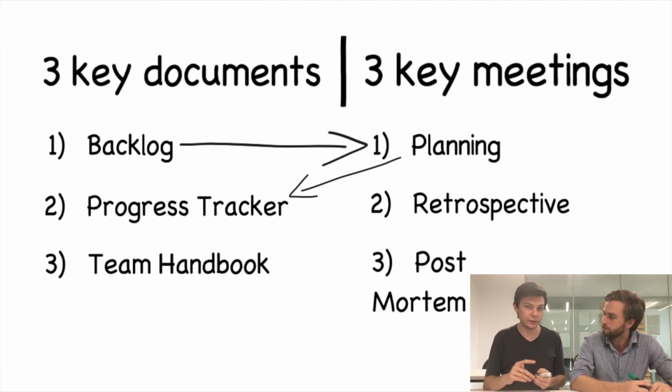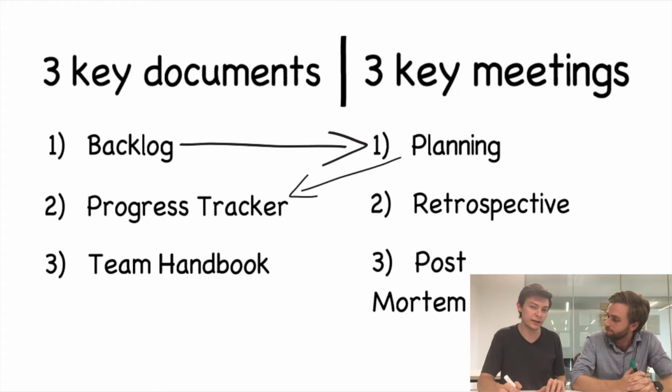At the beginning of the sprint, you pick your priorities and what you want to be working on, so that way in the middle of the sprint you don't have to change and confuse your team with new priorities or new tasks to be working on. The most important part of the planning meeting is prioritization. If you get that right, then your team will always be working on the tasks that are most important and most urgent. If you do a poor job of that, then your team might wonder why they're working on certain things at a particular point in time.